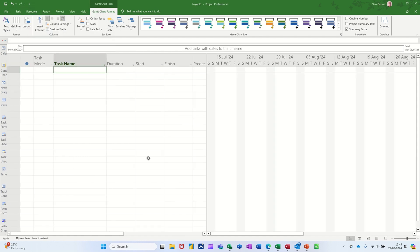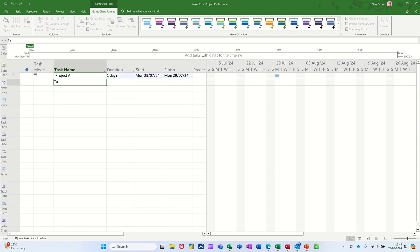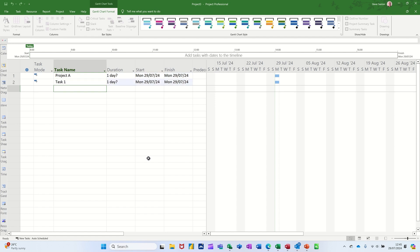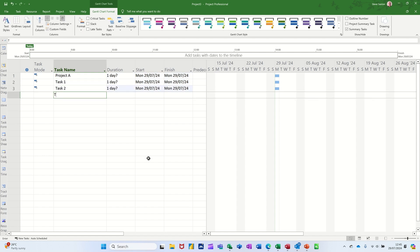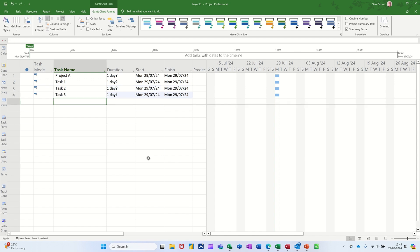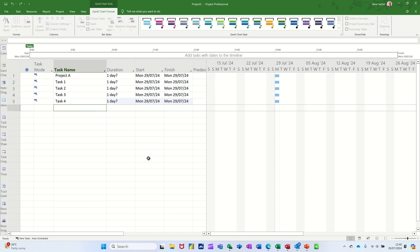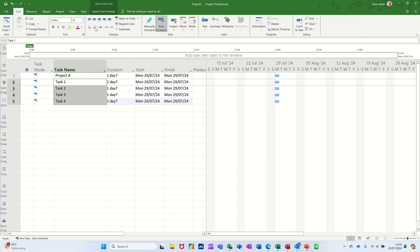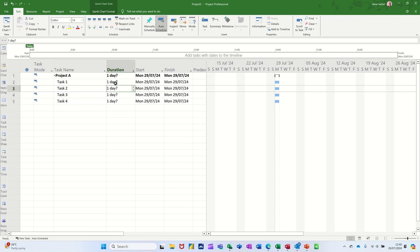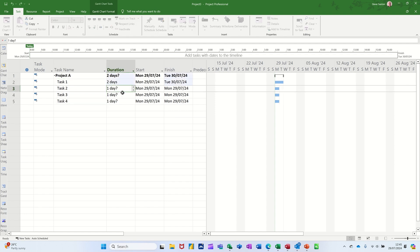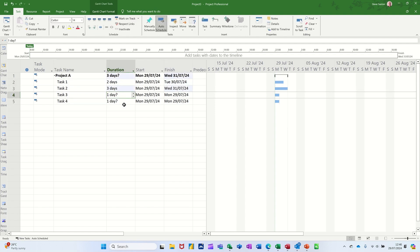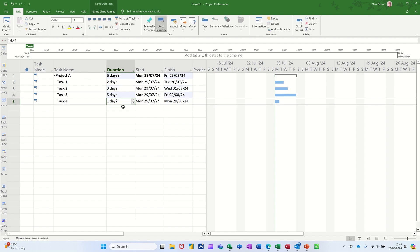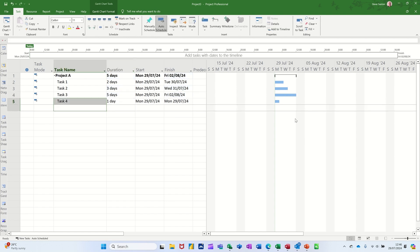I'll just do a few tasks: Project A, Task 1, Task 2, Task 3. Let's indent these - go back to tasks, indent them in, and let's give some duration. So let's say 4 days, 6 days, 2 days, 3 days, 5 days. There's my tasks.